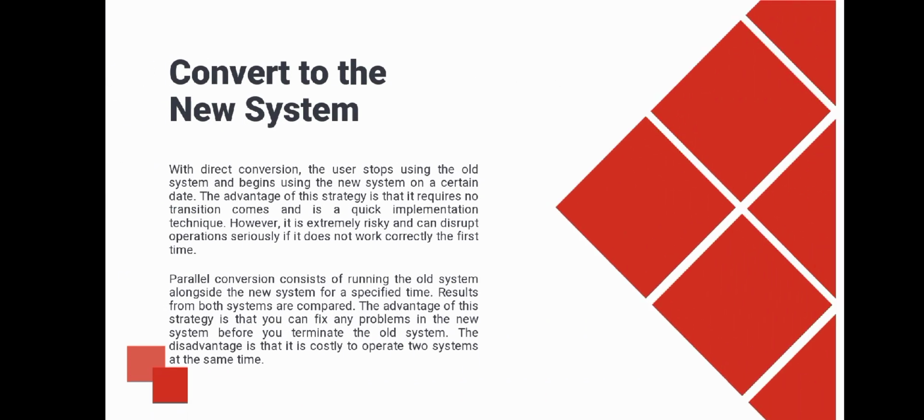Convert to the new system. With direct conversion, the user stops using the old system and begins using the new system on a certain date. The advantage of this strategy is that it requires no transition and is a quick implementation technique. However, it is extremely risky and can disrupt operations seriously if it doesn't work the first time.